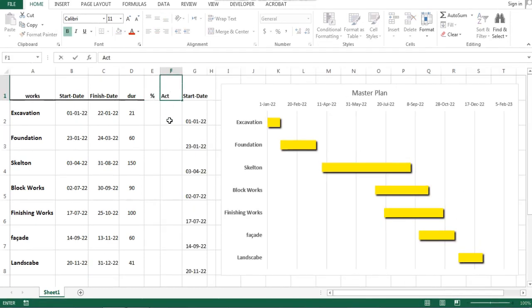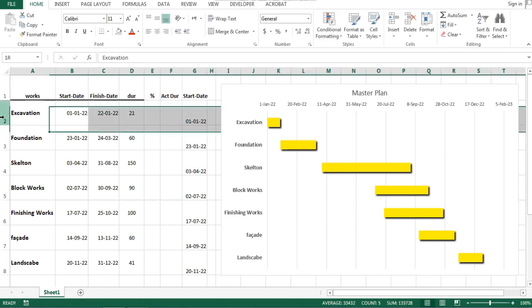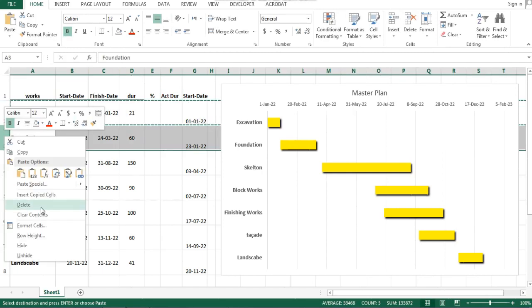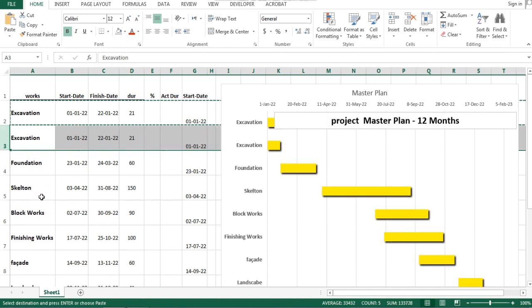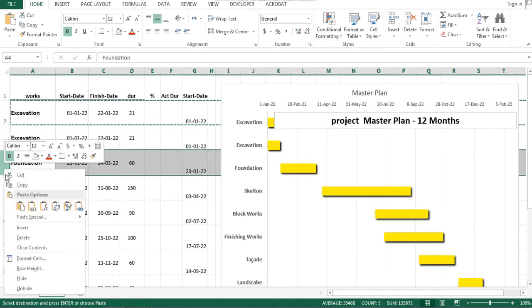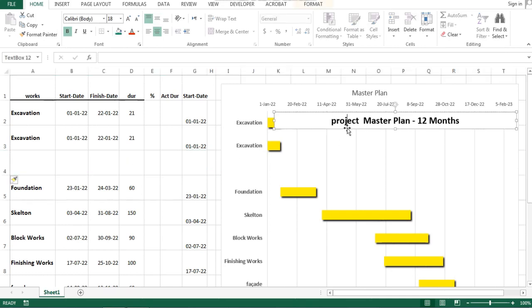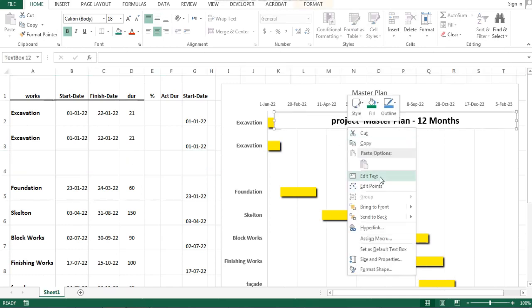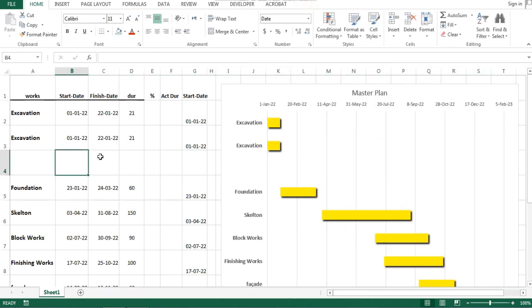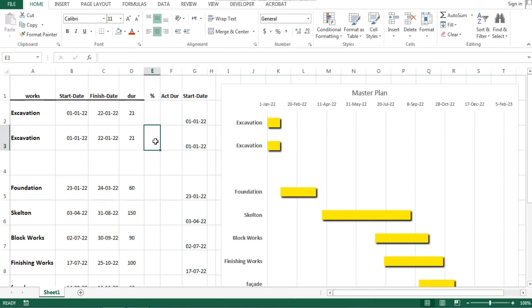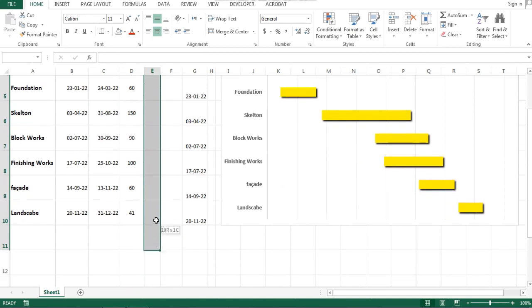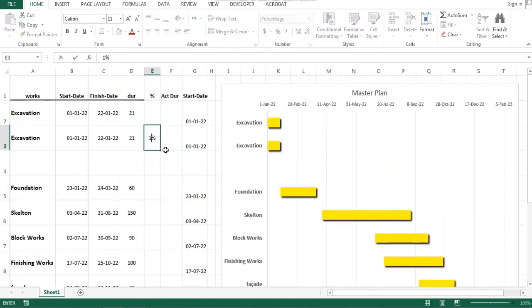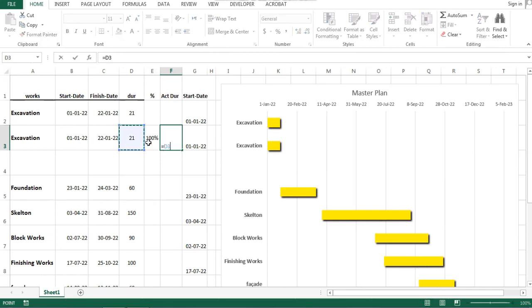Now we are ready to follow up the progress. Fill the data for actual dates and the percentage of completion. Copy the row for the excavation activity, then paste this row down to make a new row for the actual status. Change the type of these cells to being percentage type. We are ready now to fill cells with the progress data.